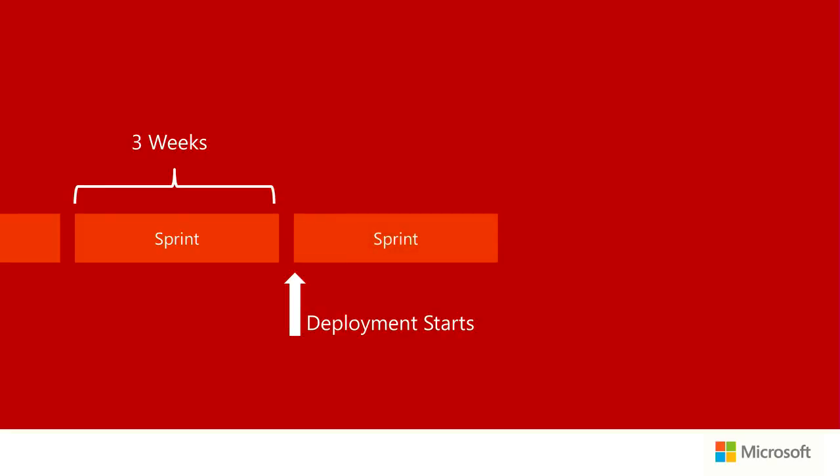The way that we approach delivering VSTS to the market is we work on an iterative cycle. We have a bunch of teams delivering software, and we're all aligned on our delivery cycles. Every 3 weeks, we produce a product increment. When we finish that product increment, we start deployment, roughly offset by a day or so, as we settle things down. We immediately start working on the next sprint, so that deployment is going whilst we're starting work on the next one. A deployment will take around a week, because we've got a ringed deployment model. We gradually deploy out to all of the various infrastructure that we run all of the VSTS accounts on.